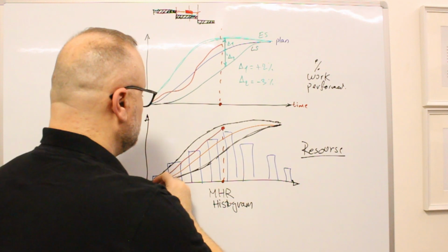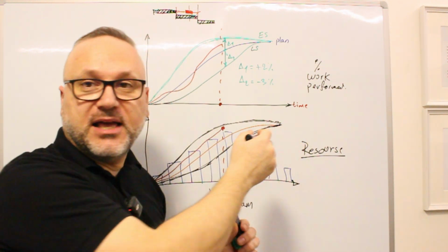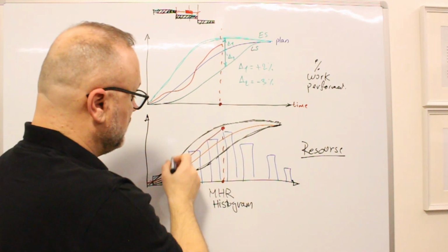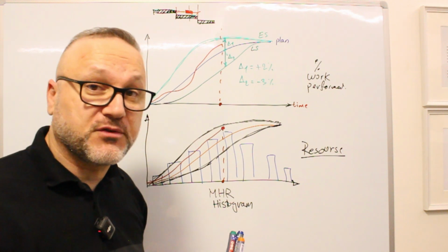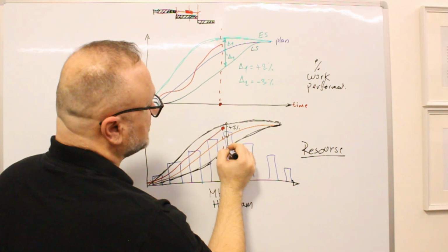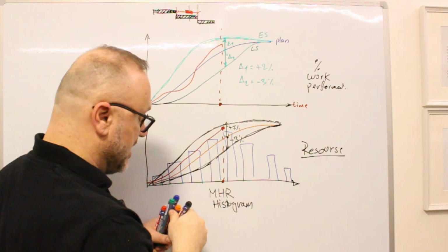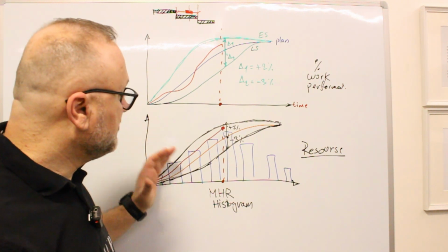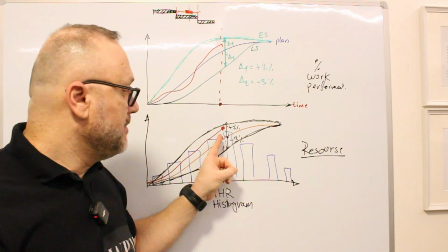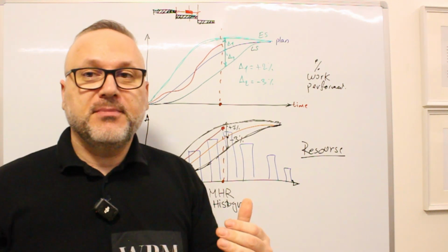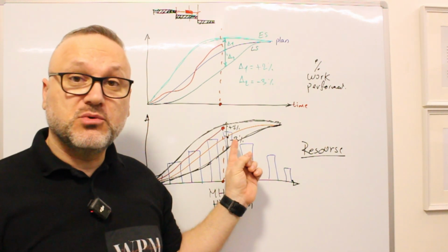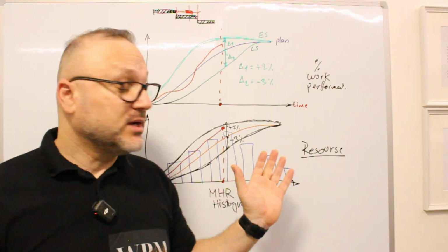I will have 2 S-curves covering the planned S-curve of my resources. I am applying the same delta deviation for each period to my man-hour S-curve. At this period, plus 2%, so I will put plus 2%. And here I have minus 3%, I will put minus 3%. And then I can say that my actual man hours are in line, even if I am taking more man hours than planned. I am basically in this contract putting invoices to the client, and he can say you are putting in invoices more than what is planned.